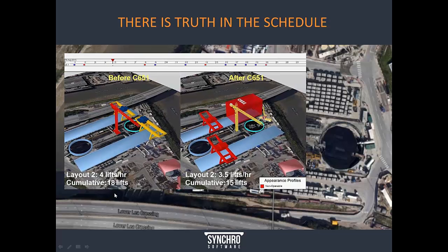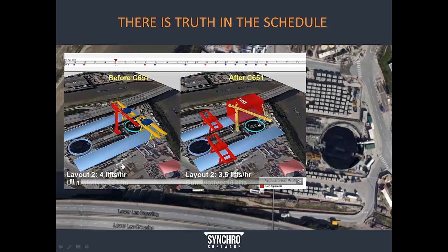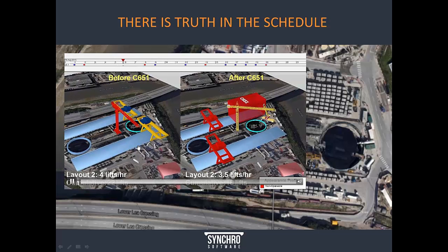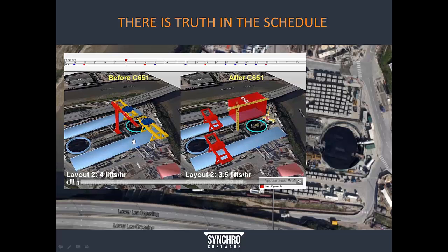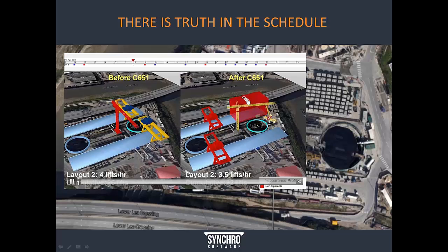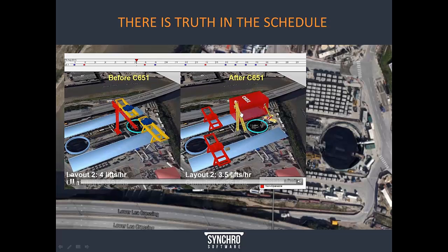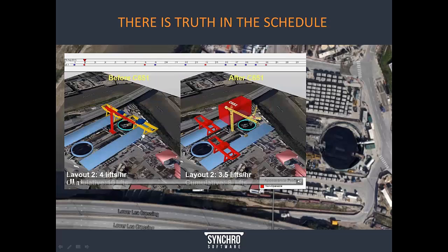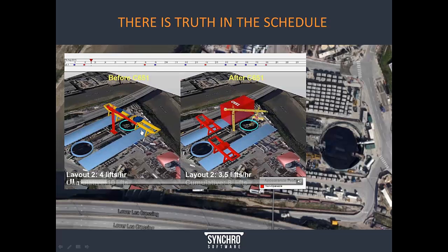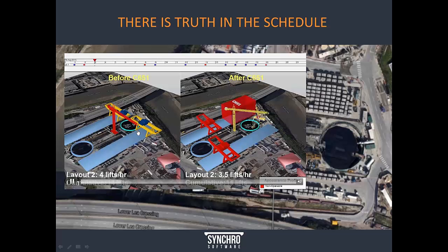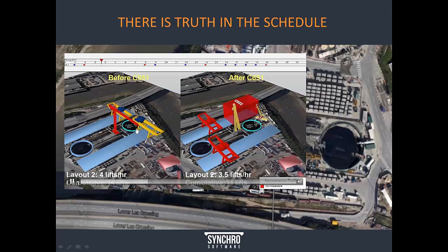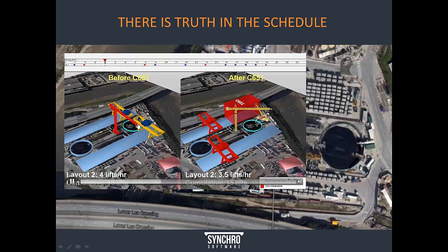So in a situation like shown here, you have a change in the condition at the job site that's initiated by the client, in terms of, say, adding another subcontractor to the job site. It disrupts the work that's being done by the other contractor in terms of crane operations. And the contractor would say, this addition of the other contractor is reducing my ability to perform as many crane picks as I've got scheduled.